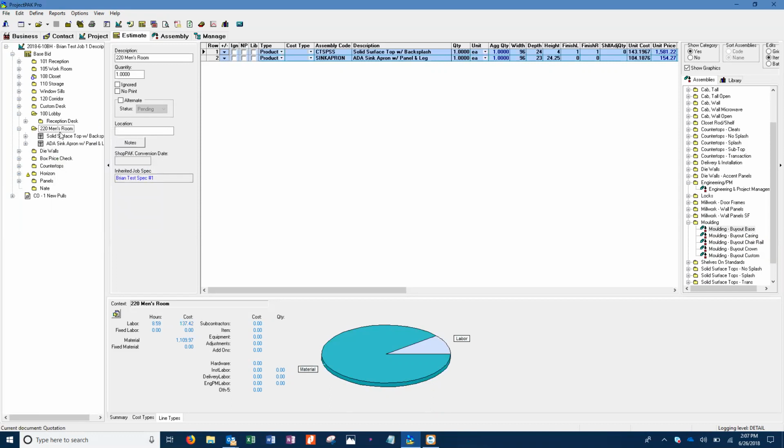Okay. If, however, you hit remove spec, it does not remove it in true nature. It removes it from the name so that you wouldn't see this in the center anymore, but it does not really remove it. So if you had mahogany in there and you hit remove spec, it'll remove the name, but the mahogany is staying until you apply another spec to it. So that's why you always want to have that default in there, because if you ever need to go back to ground zero, you want to apply the default again.